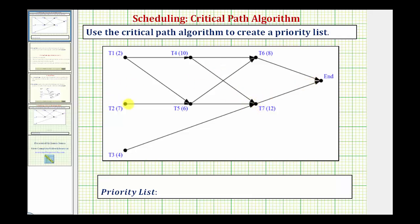Let's try from task two. Notice if we go from task two to task five, to task seven to the end, that would be seven plus six plus 12, or 25 hours. So if we can't find a path that takes longer, this path would be our critical path, taking 25 hours.